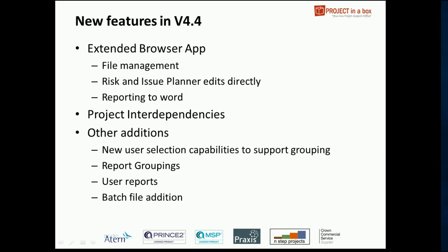We've also put in a major functional area which is adding project interdependencies. So you can now have a task within one project starting after a task within another project. You simply set up that link, and every time the first project is checked out and updated, it will then sync out the second project and update that accordingly, shifting its tasks along as required. And if there are any following projects from that, again they will ripple down, updating the project dependencies and the timelines for those various projects.